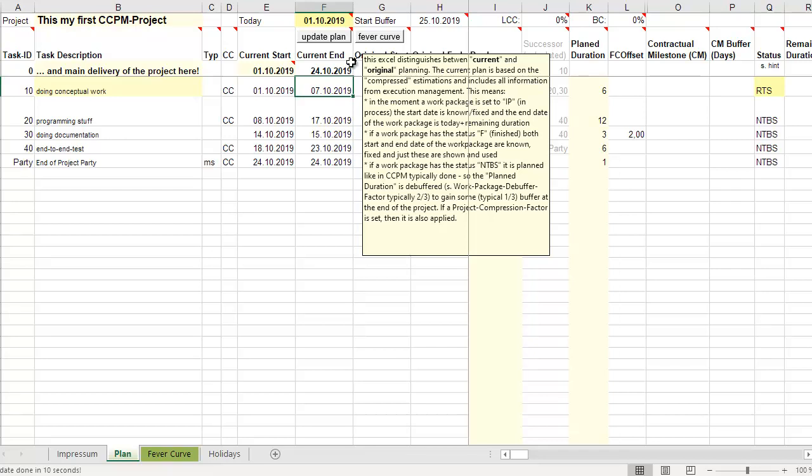That's all about where the buffer is coming from, how the buffer can be seen here in the fever curve in the Excel, and that's a precondition for doing good execution management. A small hint: a buffer must be something around 30% in the end, because if the buffer is too short, no one really believes in buffering. If it's too long, you'll get student syndrome and stuff like this. In practice, something between 25% and 30%, 33% is perfect.